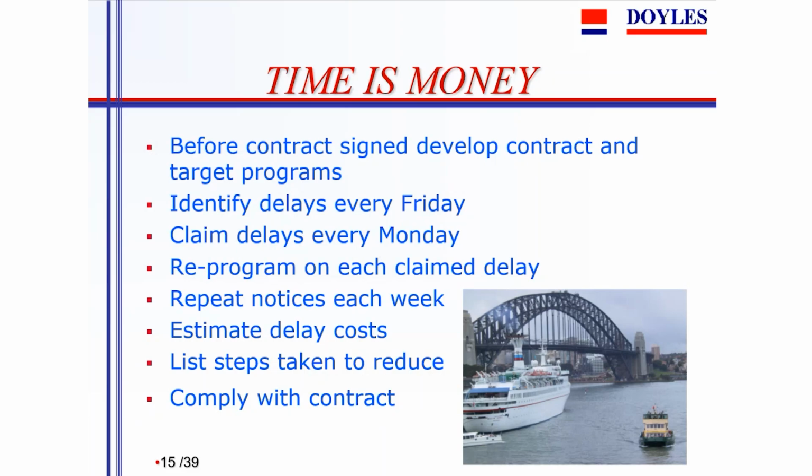So if you're concerned about that, you can see a risk, it might be appropriate to say, if there's less than 10,000 litres, then it'll be a certain amount. And if it's more than 10 to 50, it'll be a certain amount. And over 50, it'll be something perhaps less. So that's variations. It's fairly basic, but you've got to follow it through carefully.